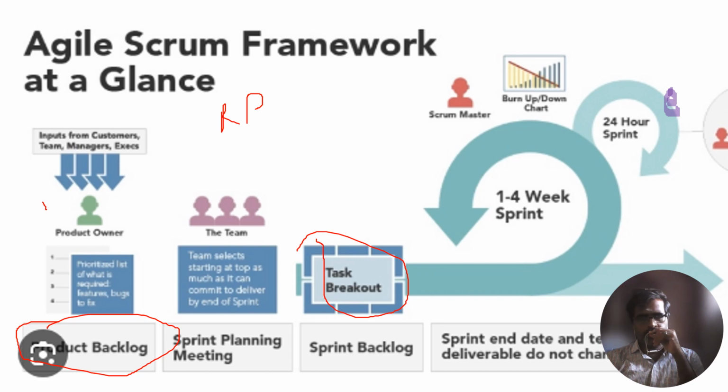The Scrum Master and the product owner are not mandatory, but if they are playing the role, then it is recommended to participate as a part of the development team. But ownership will be with the development team. No other points are allowed to be discussed. Do not discuss personal, other project related or finance related matters. Only what has been achieved yesterday, what will be achieved today, and what are the obstacles in the work. These 3 points should be discussed in the meeting.